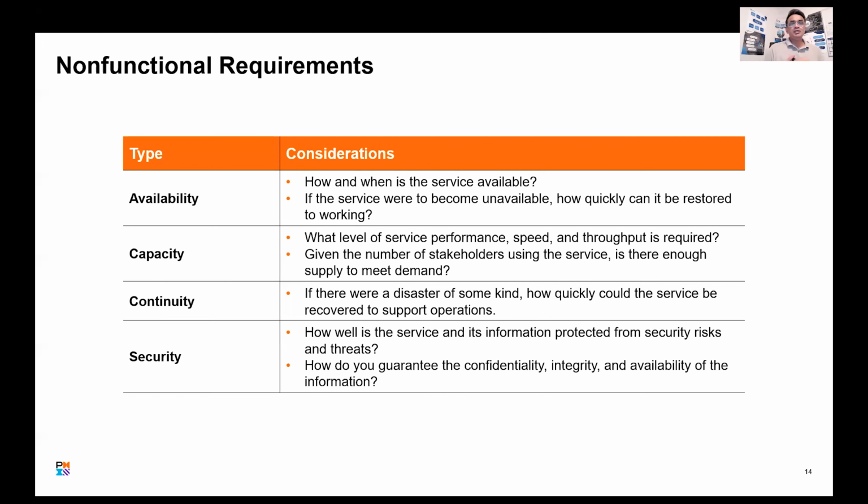You don't write the entire compliance requirement in your project plan, because you can refer to where it is available. Like when I tell you guys to go and read this in PMBOK, I'm not opening the PMBOK and reading it again and again, right? But yes, you're right. The plan would refer to that particular document you need to comply with. And that happens pretty commonly, in fact.